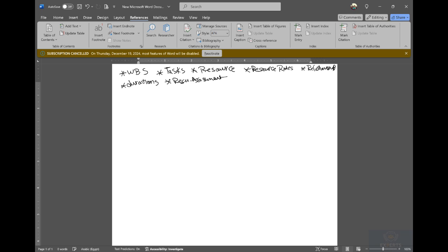Okay, so we have 4 methods, and number 1 is manual. I mean how to insert all this data which you get and which you calculate into Primavera. Okay, WBS, we understand how to get tasks, the activities, which we get from the breakdown of the main activities, resources from the definition which we get, and from checking the procurement and approved material, and like this.